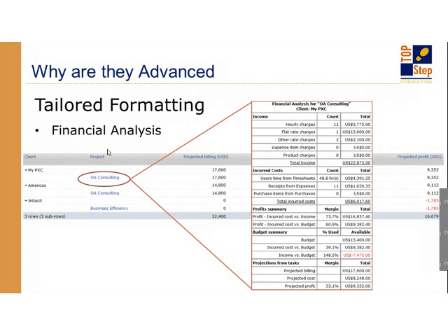It does require that you're using the revenue and billing to make all of the values here, and also that you have cost in the system to make all of the values meaningful in the report. You can get some funny numbers if you don't have costs in here. Some of the numbers may not make sense. Things like profit, et cetera, won't be of value. And again, this is still driven by a resource's access. So if the resource doesn't have access to cost rates, they're not going to be able to see the cost information. Or if they don't have access to billing, they won't see the billing information.